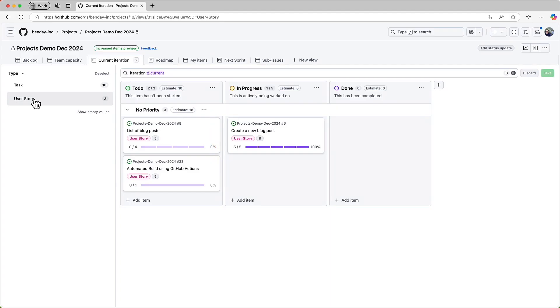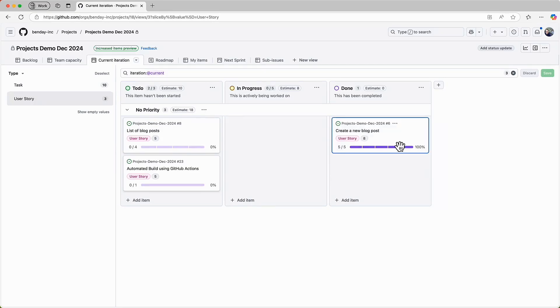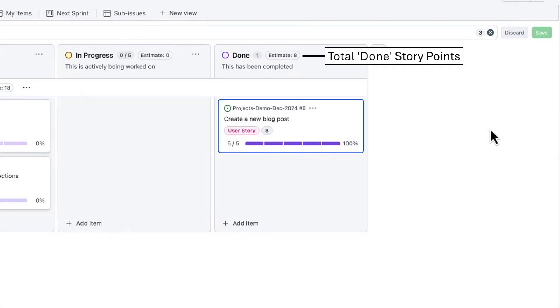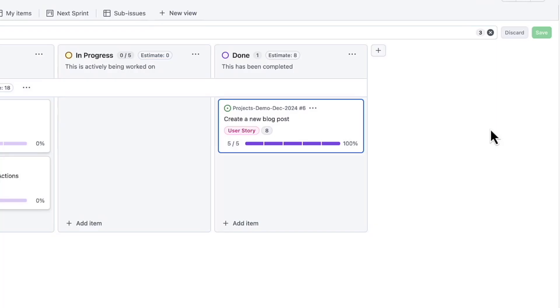The product owner says that this is done. So let's mark the PBI as done. To mark it as done, just drag the card into the done column. And now the team has one PBI done. And the estimate total for the user story item type has gone from zero to eight. Remember for PBIs, aka user stories, we're putting story points into the estimate field. There's a metric in scrum called velocity that measures how much done stuff got delivered by the team in a sprint. Well, the team got one thing done. So this far in this sprint, they've got a velocity of eight. Put another way, this estimate total in the done column represents your sprint's velocity.